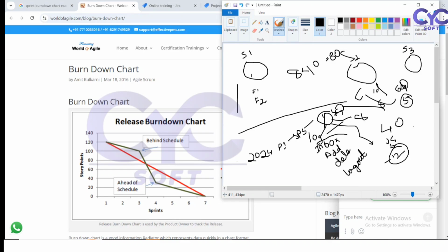In a user story, you are going to create subtasks. For example, login is a user story. In the login, I have subtasks like login, forgot password, create account, and deactivate account. These are the four tasks I need to complete on this particular story. To complete these four tasks, they have given some story points. So within these 12 hours, I have to complete my task. Whenever I am completing my task, I move it to in progress.